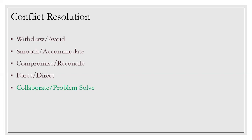Second: Smooth or Accommodate — the PM avoids a tough discussion by applying a temporary fix. For example, if a partner team lacks the budget to hire a resource, the PM might share a resource from another team with similar skills to get the job done. This technique also works when the stakes are low and when the PM is trying to avoid a difficult conversation. Both Withdraw and Smooth are not very effective as long-term solutions.